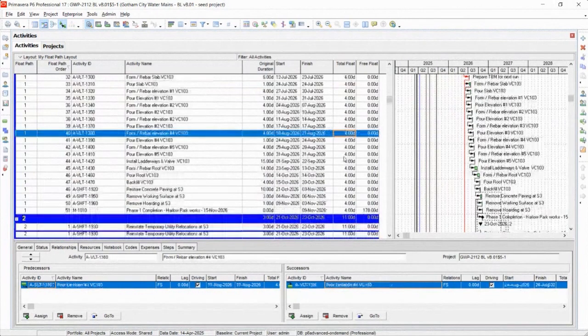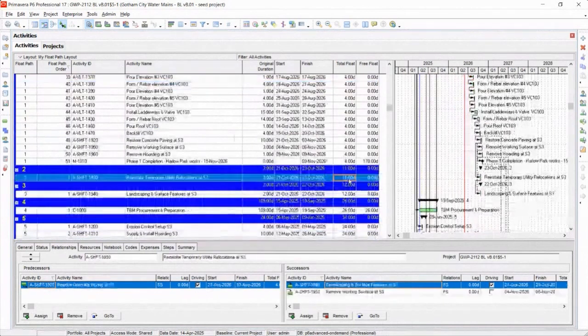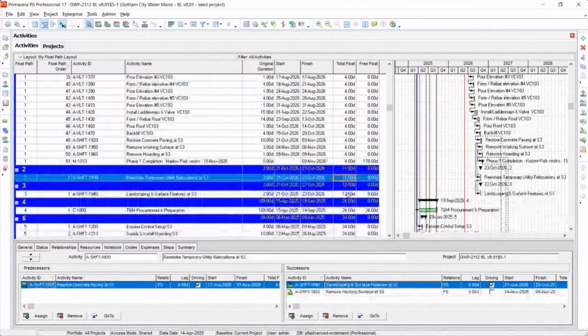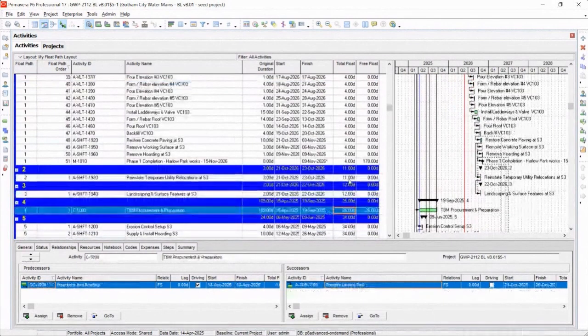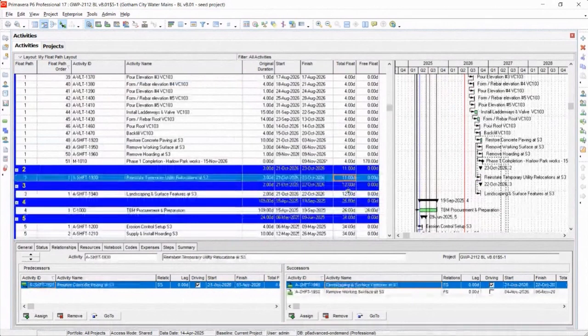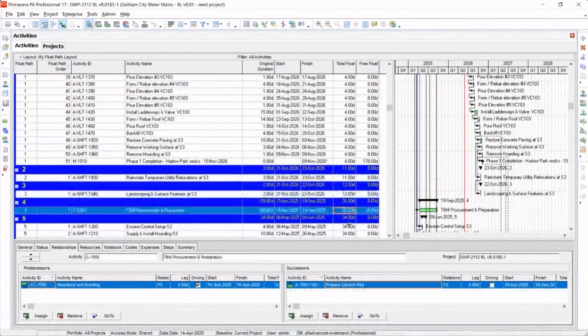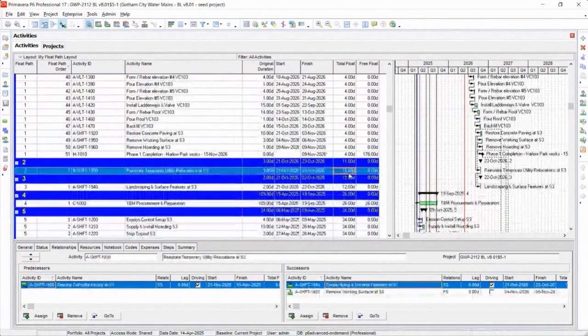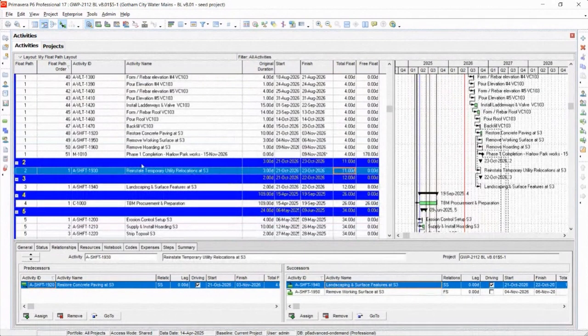Okay, so anytime I'm scrutinizing this stuff, you can see that the next float path activities have increasing total float. So that's an issue. Well, it's not an issue, but it's an indicator of how near-critical they are.